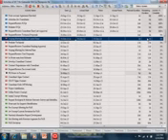So let's say the last time your project was updated was December 1st. And then I put an actual start date of December 15th, or let's say December 10th, because I know the next time I reschedule the project, it's going to be December 15th. So the old data date is December 1st, so I put the start date in the future.